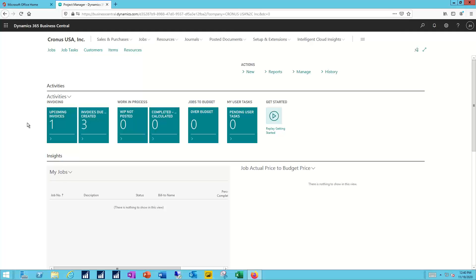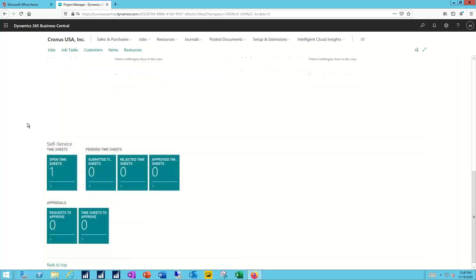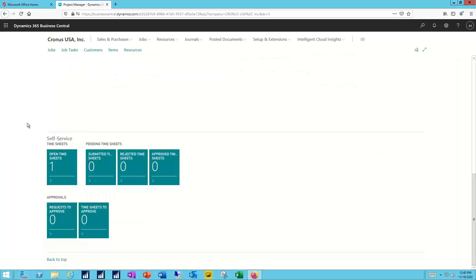As part of updating a job, one of the activities would be entering time. In the Business Central system you can either enter time for yourself if you have a Business Central license or you can set up the jobs module to allow for a manager to enter time on behalf of their team.